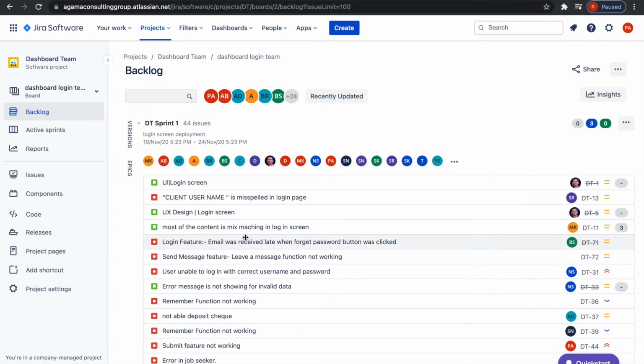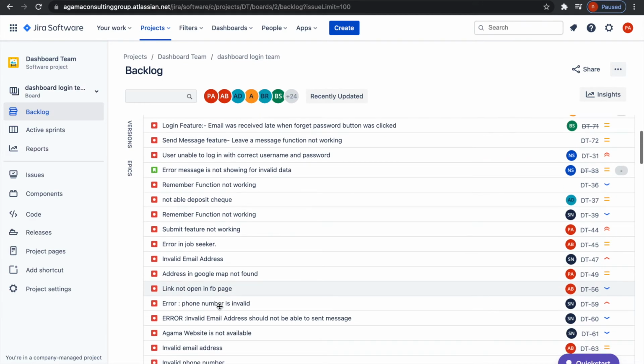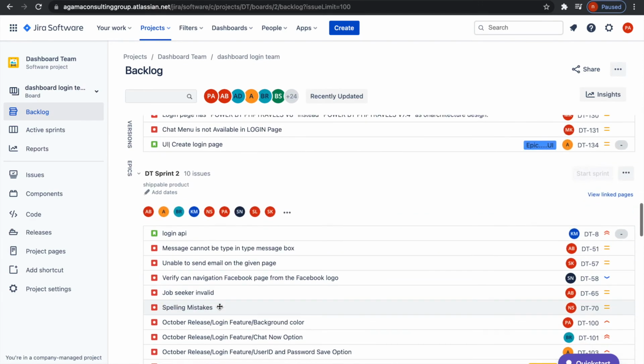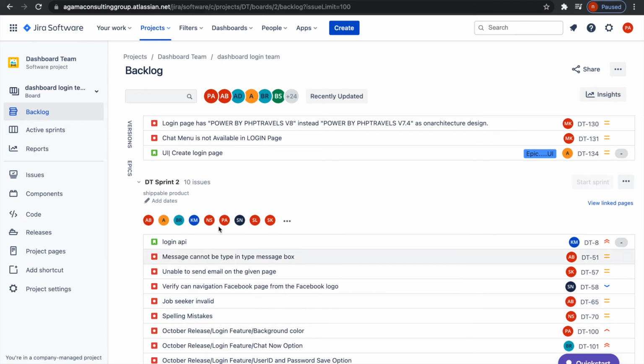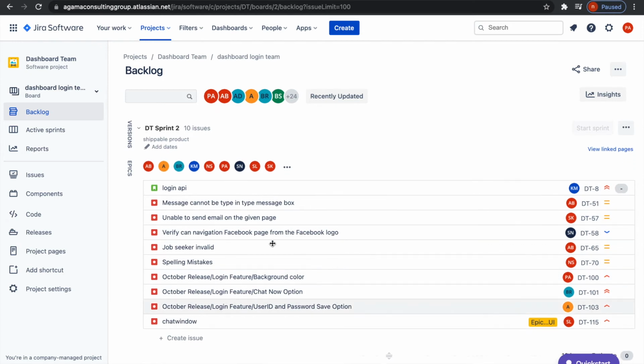does that backlog mean? Backlog means a collection where all the user stories lie which have not been prioritized. So this is the backlog, and it has all the tickets here, as you can see. So what is the sprint backlog then? Let's say if we assign any story, task, or defect to a particular sprint, then that information comes under the sprint backlog. As you can see here, under Sprint 2, this is what the work looks like.